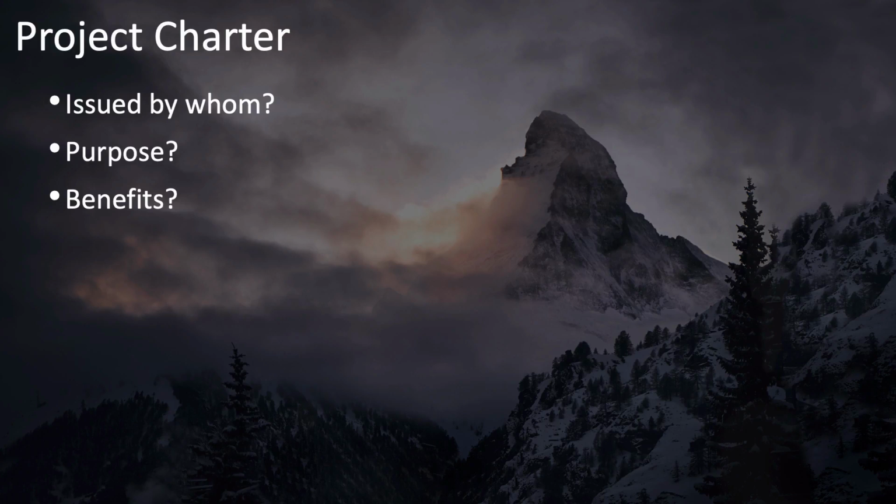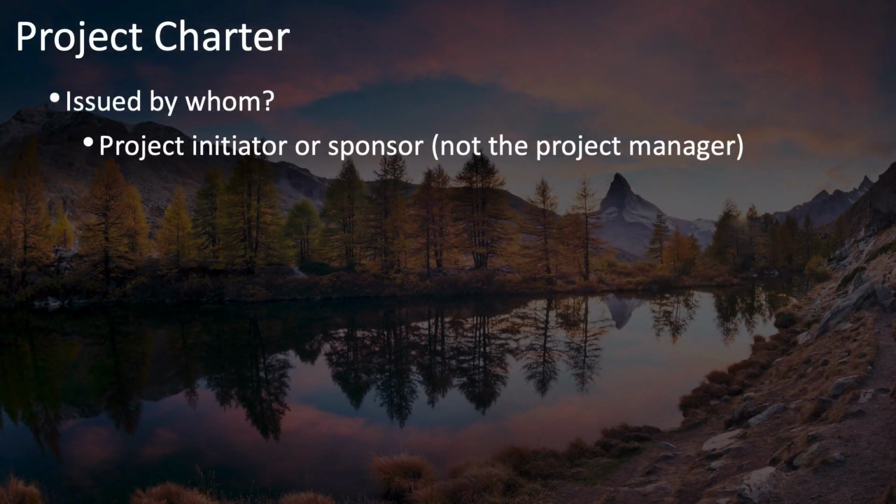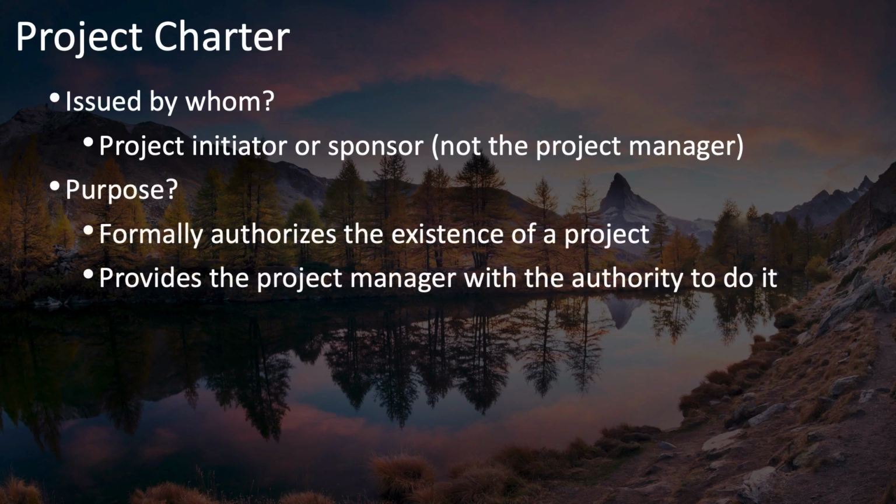Regarding the project charter, who issues the project charter? What is its purpose? And what are the benefits of the project charter itself? The project charter is issued by the project initiator or project sponsor, not the project manager. The purpose of the project charter is to formally authorize the existence of a project and to provide the project manager with the authority to manage the project.